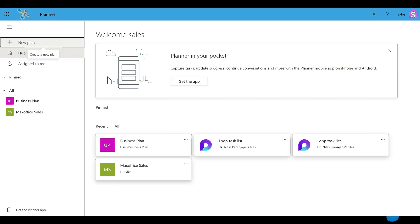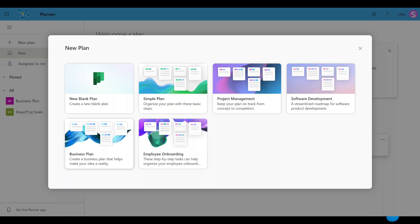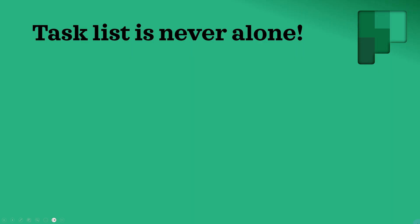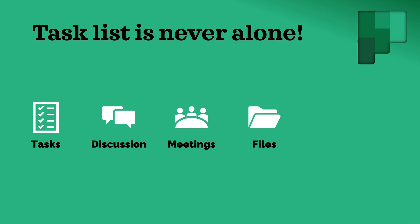You can create a plan directly in Planner and it gives you a few templates like business plan, project plan, software template. That's not a bad idea just to learn how Planner works — go through those templates to learn the features of Planner. But do not create a plan in Planner and add members. Why? Because when you have a shared task list, it's not only about managing the task list. You will need to discuss about it. You will have to have meetings with the members, you will need files — all that Planner will not manage.